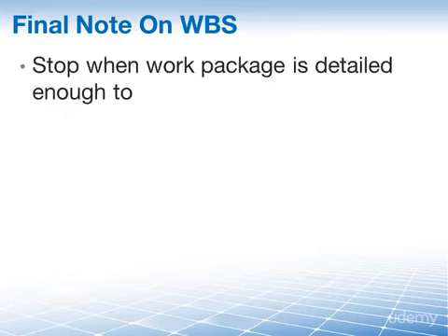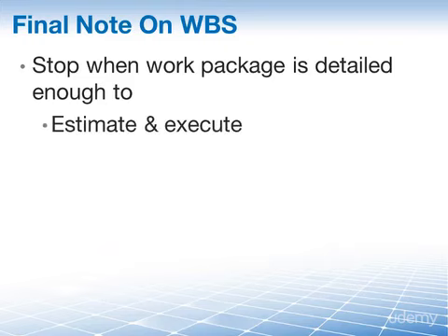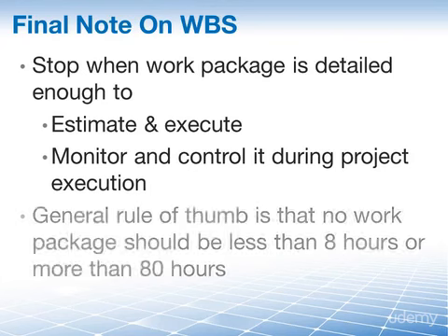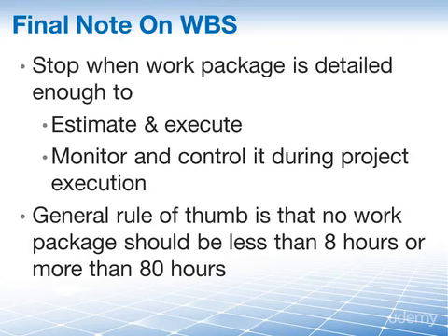Well, the answer is that you can stop when you have reached a level at which the work package is detailed enough to estimate and execute and also monitor and control it during project execution. The more general rule of thumb here is that no work package should be less than 8 hours or more than 80 hours of work for the person or group to whom this is going to be assigned to for completion.